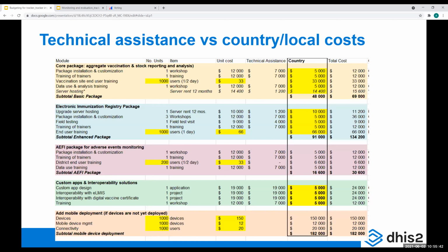Yeah. Because probably at one point you would want to make changes, and ideally you should never make these changes in production. So you will implement those changes, and probably you have to train your users on those changes. So probably you would like to keep it. The good thing is that this training server instance does not need to be as powerful probably as your server, so you will probably be able to run this at a much lower cost.